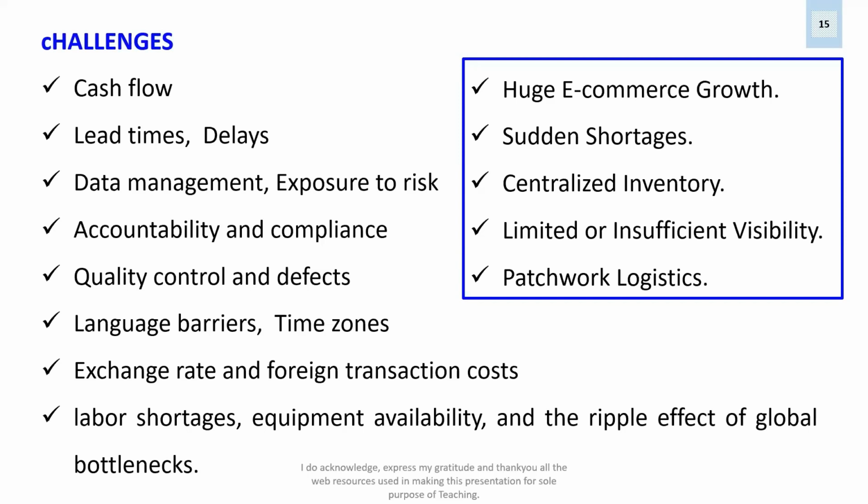Exchange rate and foreign transaction costs. We know that when you are doing an exchange, there is an exchange rate, okay, and there are transaction costs, Incoterms, letters of credit. So these are all the things which are challenges. And challenge means they are essentially required to be looked into. Their rates are changing. Correct. Their transaction costs are changing over a period of time. So these are the challenges, because you estimate some project, you estimate some deliveries based on some assumption, but when it comes to realizing the deliveries, these things could impact.